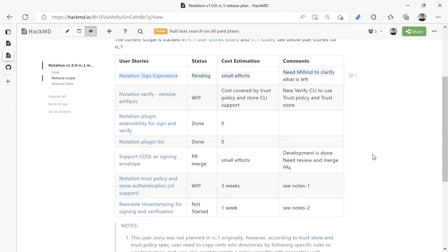I think it should be, because I assume RC1, RC2, our pre-GA, will have more bugs, issues, edge cases that we would smoothen out as we get feedback, right? And if you want that cycle to be smoother and us to respond effectively, not spend too much time troubleshooting and trying to reproduce issues, that's where the diagnostics logging will help. Maybe a week of effort is what it'll take, but it'll save time for all of the developers who will be supporting this. I don't disagree. I think it's just a matter of what the timing is and whether we have resources to do that.